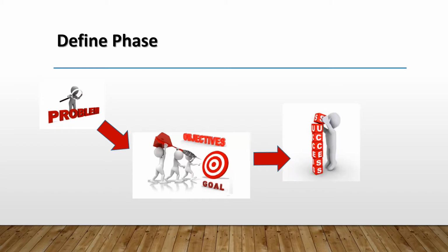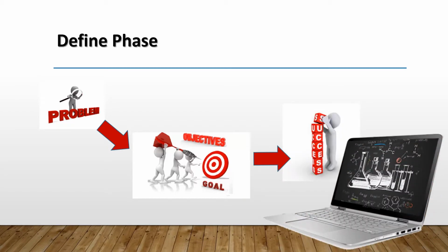So, how will we measure our success? To measure our success, we've defined 3 success criteria. First, that the 3 chemistry courses are, of course, available in the university's online courseware. Second, the chemistry faculty is trained in using the online courseware and has introductory experience in delivering online instruction through the courseware. And third, that the students show an increased satisfaction with the course after completing the formative and summative evaluations.